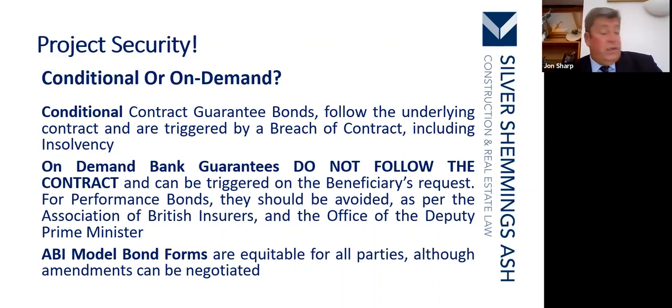Conditional contract guarantee bonds follow the underlying contract and are triggered by a breach of contract, including insolvency, but that's different to having an on-demand guarantee.